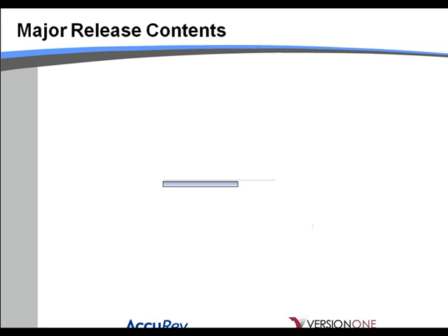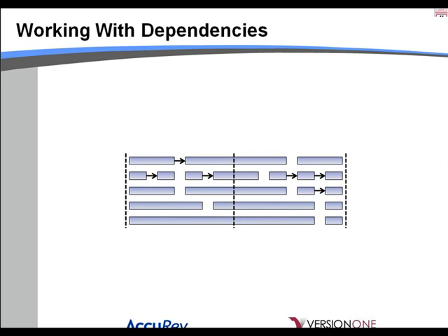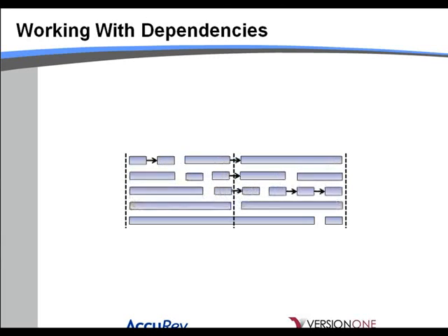Okay, so let's look at one piece of this. Let's blow it up. Because one of the things you probably were thinking is, I can't just rearrange these things willy-nilly, Damon. You understand that there are dependencies in there. Okay, fair enough. So let's say there's some tasks in here that have interdependencies, and that's one of the reasons that they're too long. And there's also some that are just plain long, longer than an iteration boundary. Well, with a little bit of effort, you can rearrange these so that the dependencies match up on an iteration boundary. So in this case, you have something that has value, but you feel like without the other feature, you just don't want to ship it.